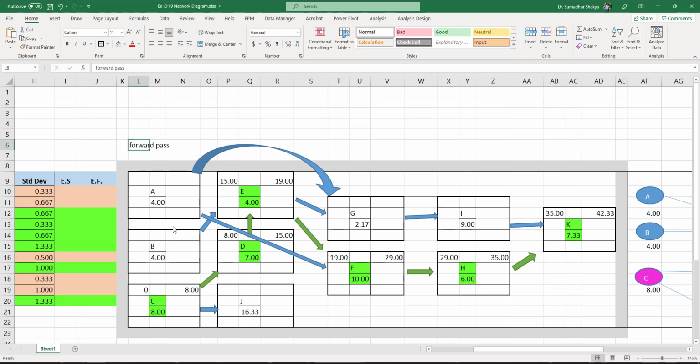The forward pass was, if this was to be all of the cooking activities, whatever you start first, going with the sequence of activities that's going to take the longest, and you proceed from left to right on this diagram. Now, the backward pass assumes that you have a deadline by which all the food has to be ready at a certain time. So let's say this was 5 p.m. of a certain date, and then you start backwards, because if each of these activities is going to take certain weeks or hours, then you better start early.